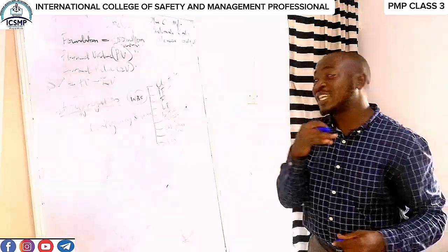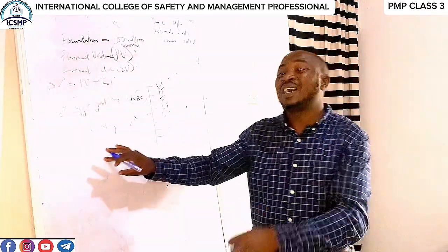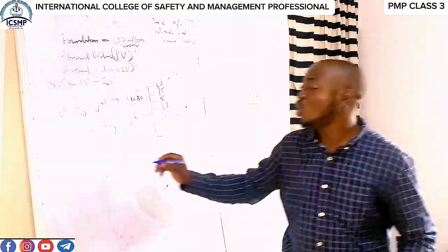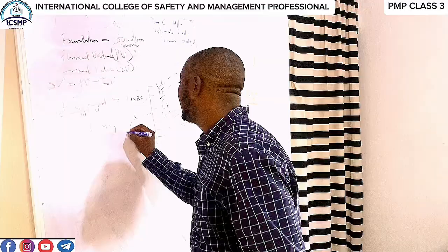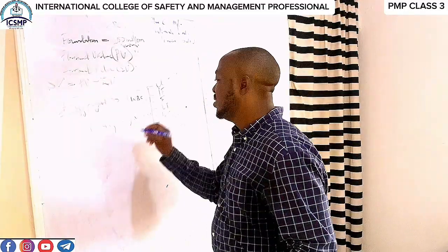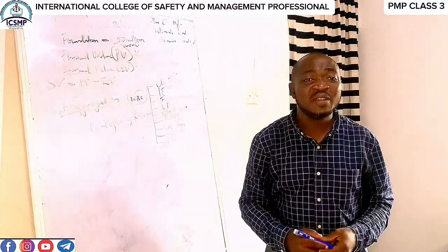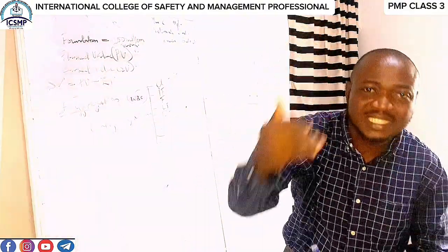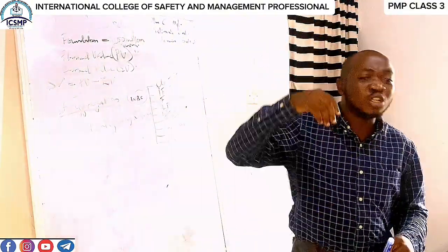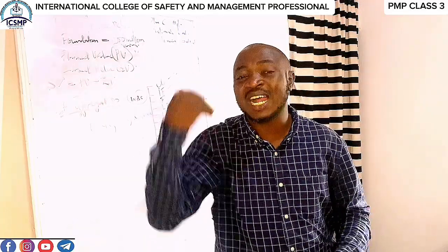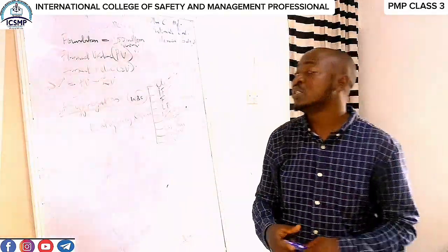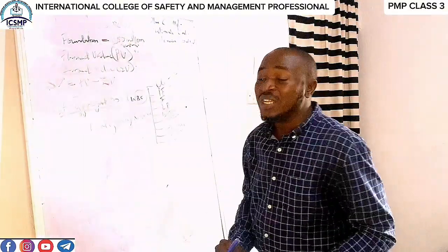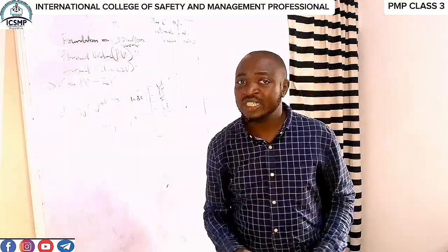Now, in project management, there's nothing like workmanship, but there's how you can bury your workmanship in what we call your management reserve. And under this management reserve is the amount we set aside for unidentified risk. That means risk that we might not be able to identify before we start work that might manifest during the project life. So now, both for contingency and management reserve, your profit is embedded in these two.